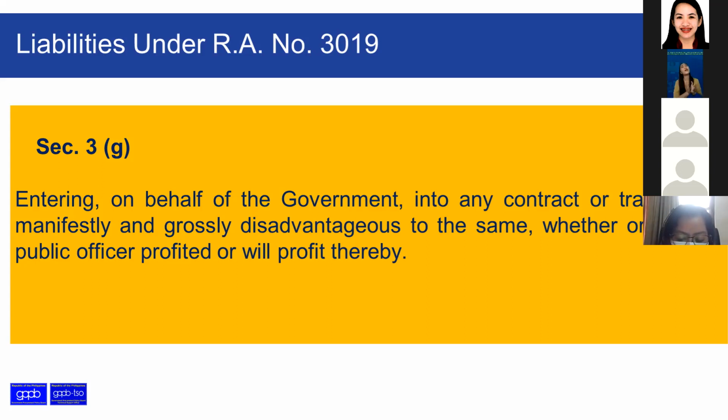Anong masama, ma'am? Kasi ganito yan. Minsan kasi, pag sobrang lobo, alam naman natin na posibleng mag-usap-usap yung mga supplier. Pag lumobo yan, susulitin niya yan. Kung 1 million sasabihin mo, magbibigay lang yan ng offer na 999,999 pesos and 99 centavos. Diba? Gaganito niyan. Sige lang, pasok naman sa ABC.